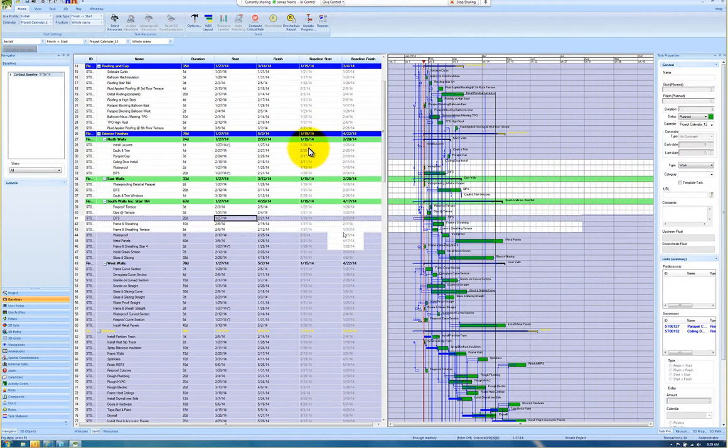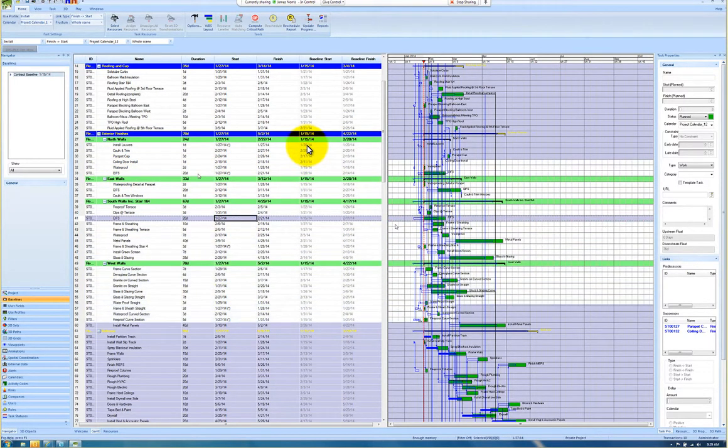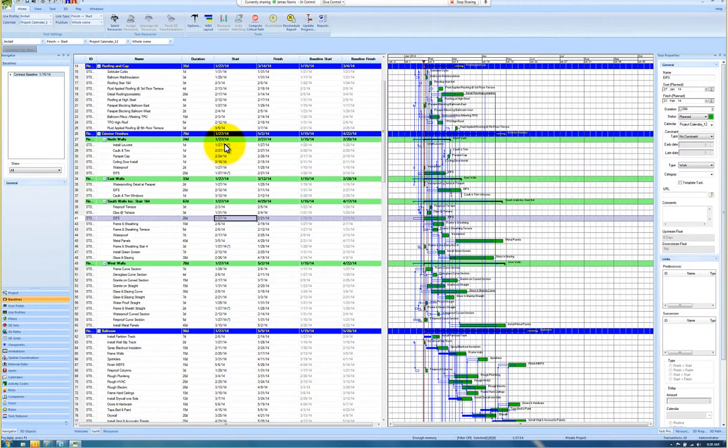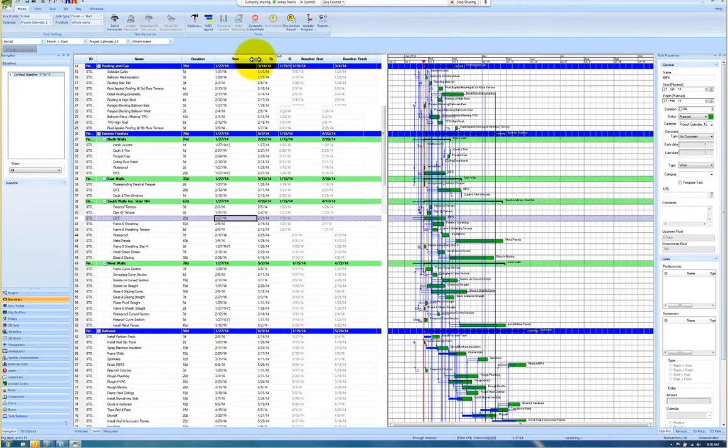It'll bring everything over in your columns. So if you see now, there is basically this memory of that baseline. So the 115 baseline shows when the original start of that task was based on that baseline, and when that baseline finish was supposed to be. And then you can compare it to the actual, the newly planned start and finish shown to the left.